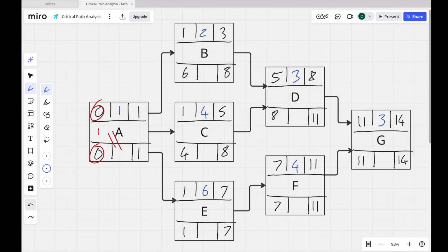All right. You can do it another way. You could do the finishes. So you could do that minus that equals the float as well. Because if you do 1 minus 1, so latest finish is 1, earliest finish is 1, 1 minus 1 equals 0. 0 minus 0 is 0. So either way you do it, you should get the same result. I used to do it as another sort of idiot check for myself, just to make sure my maths was sound.